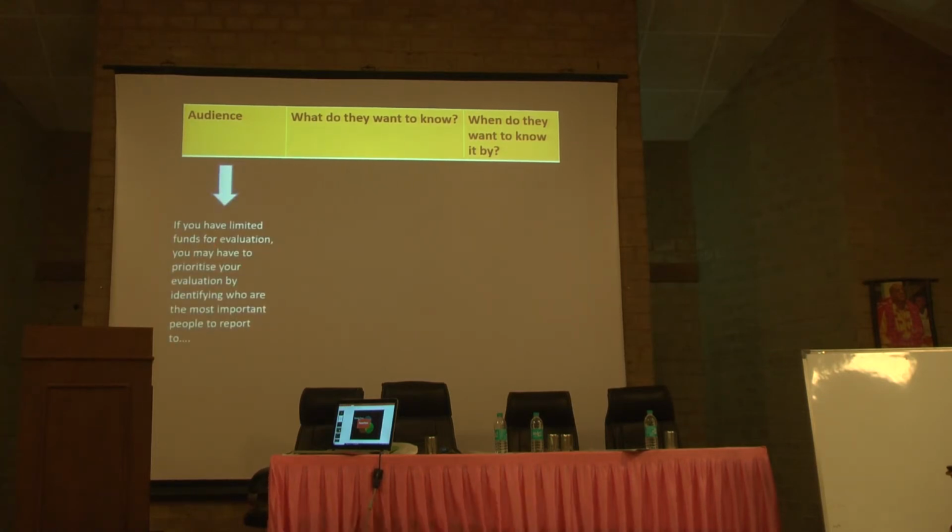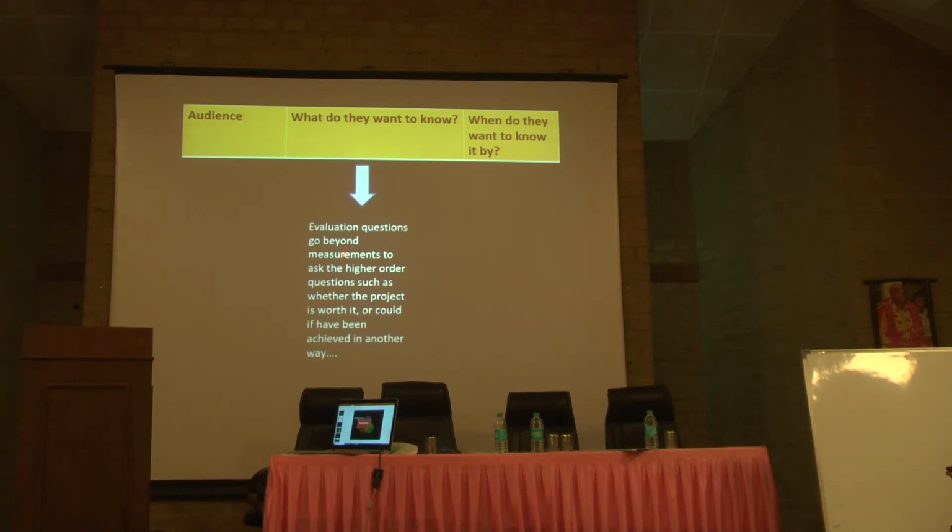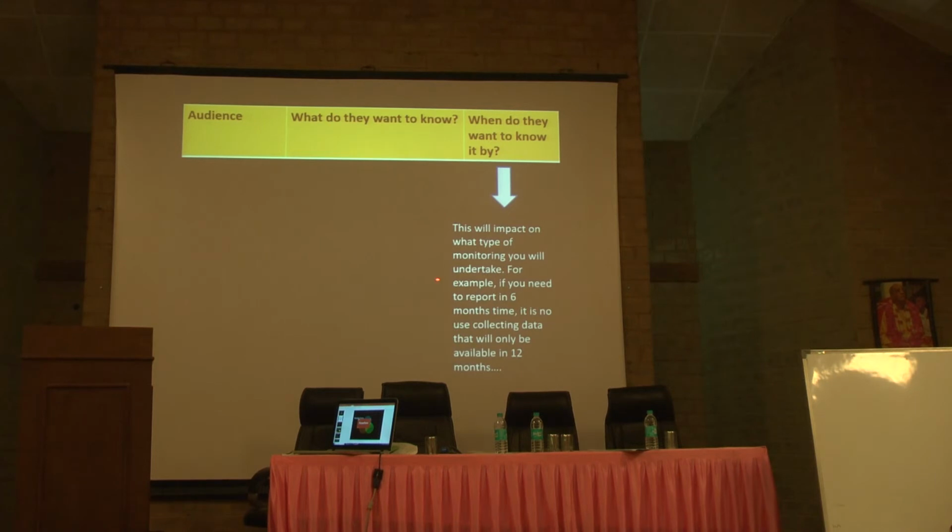You may have to prioritize this. It goes beyond measurements to ask the higher order questions, such as whether the project is worth it, or could it have been achieved in another way? When do they want to know it? That will be, like maybe they need a report in 6 months' time, so it's no use collecting data that will only be available in 12 months.